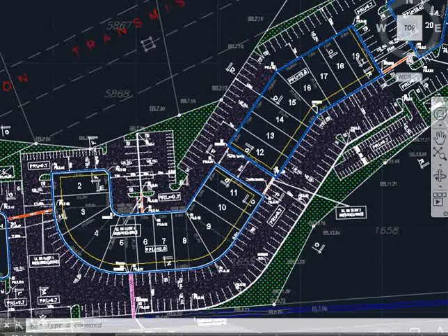Should you want to have the development, such as for industrial purposes, there should be a process of converting the land title from agricultural land into mixed development land. Later, there should be subdivisions of the land into various units, so that every subdivided lot shall have a separate title, allowing the lots to be owned by different parties separately.